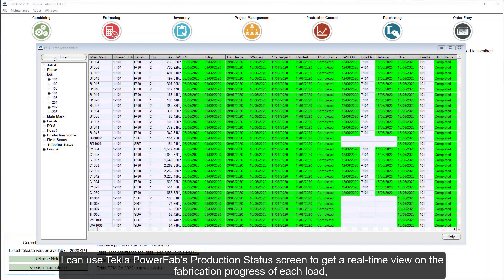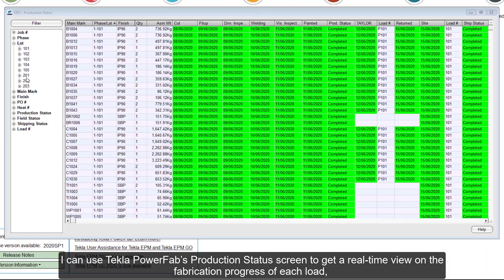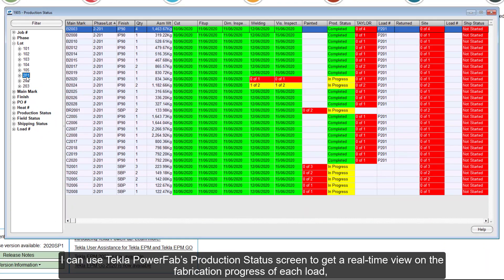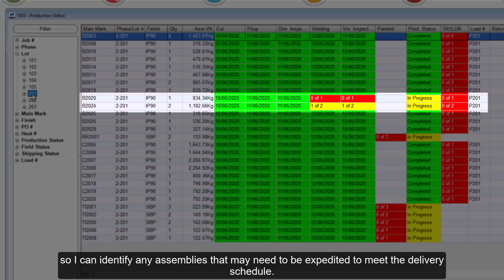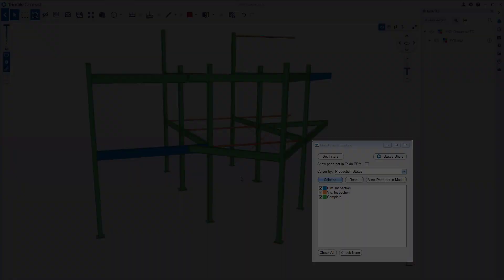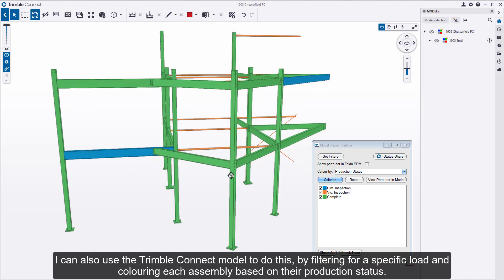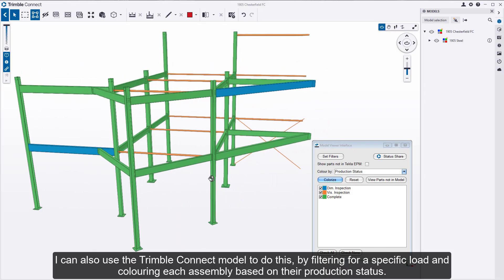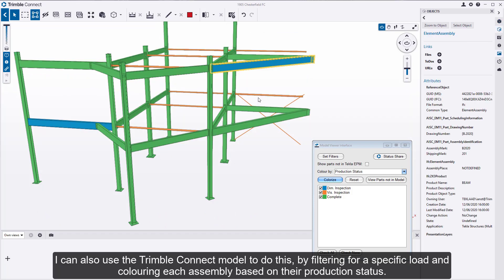I can use Tekla PowerFab's production status screen to get a real-time view on the fabrication progress of each load, so I can identify any assemblies that may need to be expedited to meet the delivery schedule. I can also use the Trimble Connect model to do this, by filtering for a specific load and coloring each assembly based on their production status.